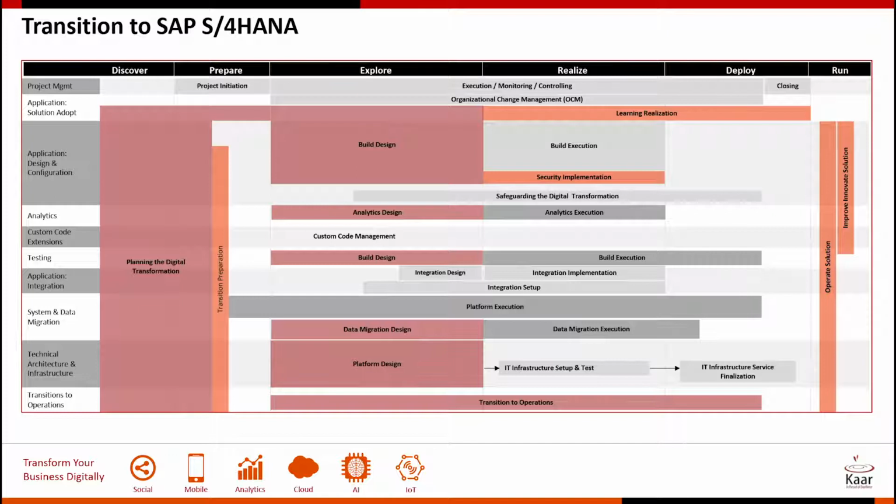So the prepare phase. What do you do during the prepare phase? This is the actual start of your S4 conversion. Here you have an L2 project plan, and you have all the strategies for the UI, for the infrastructure, the testing, the reporting, the cutover, governance. Everything is finalized in this phase.